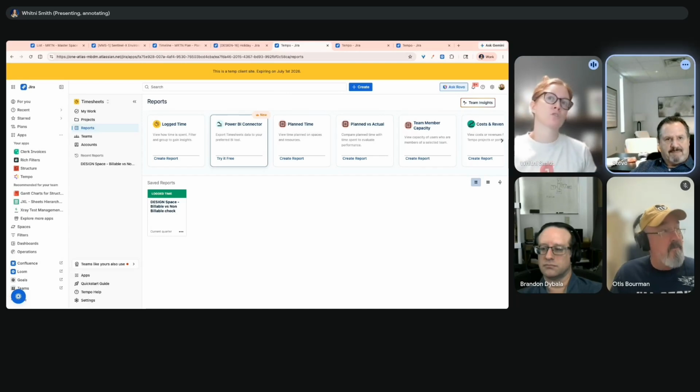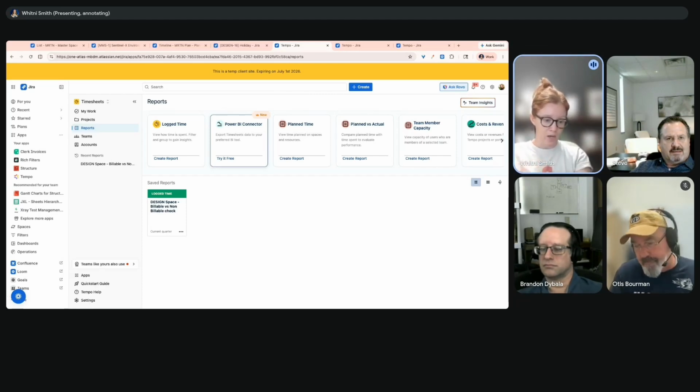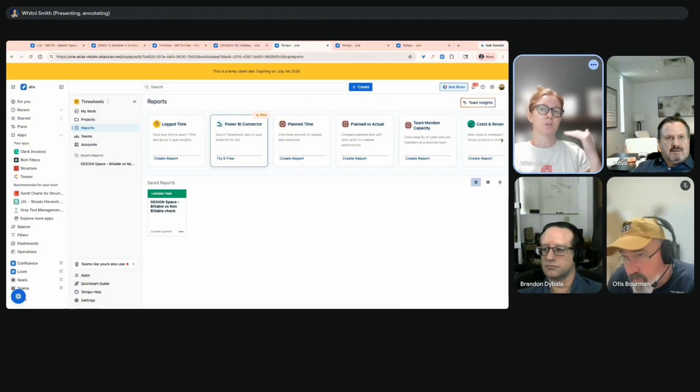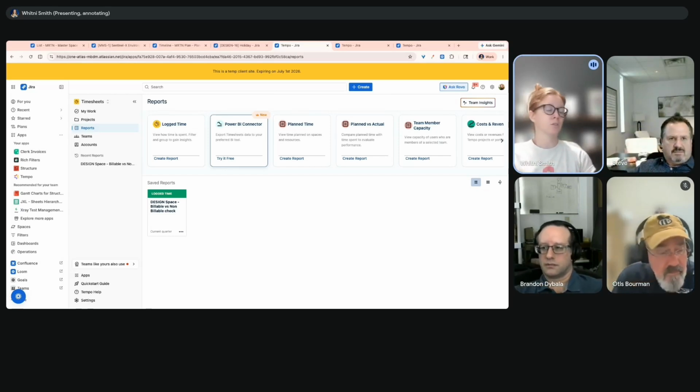Okay, so the hour breakdown and the forecasting of that is doable, as long as it's a 1-to-1 for the task and who owns the task. It does get convoluted if you have a task and 5 people are logging time against it. That's where we would have to make sure we can pull it out of Tempo, because that's the time logging, versus this is your allocation estimate, and this is what you've been burning down against it in the dashboard. That's easier to do, but I'll get an answer for you one way or the other.